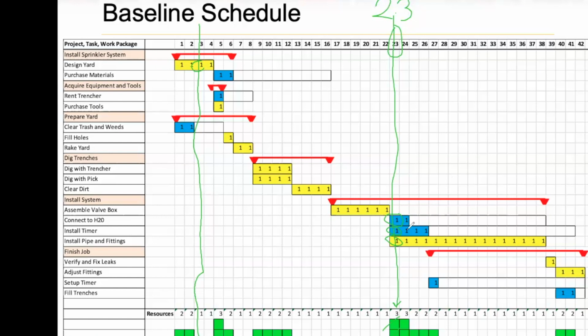Well, let's erase this. If I move this block, because this is the slack time, right? The empty squares are slack times. So if I move this box over here, like this, what happens to the 23rd? Now there will be only 2 blocks, since I moved this one.